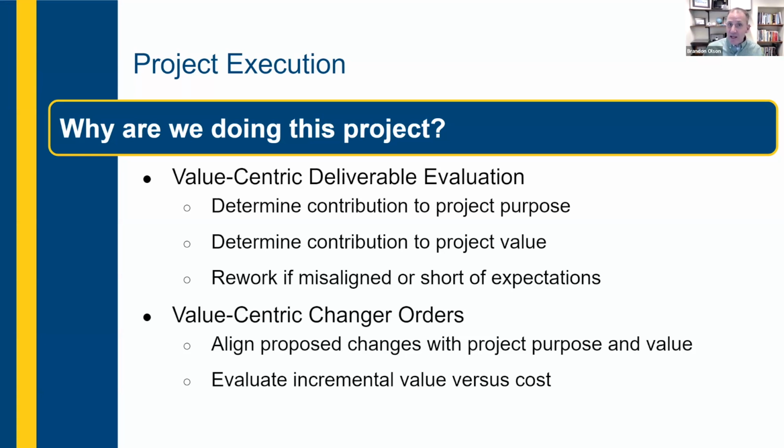Therefore, we're going to have to increase our project budget to accommodate that, as well as maybe some additional timelines to accommodate that change as well. These change orders are then evaluated: the project manager works with the project sponsor to see if the sponsor wants to pursue this change order or not. So we don't automatically modify the scope. We go through this change order process to officially reset our project variables.